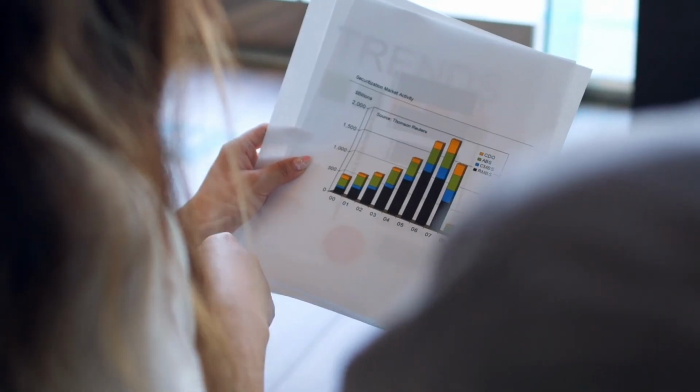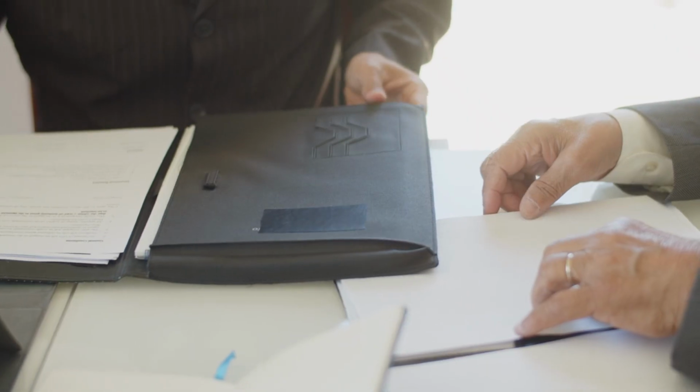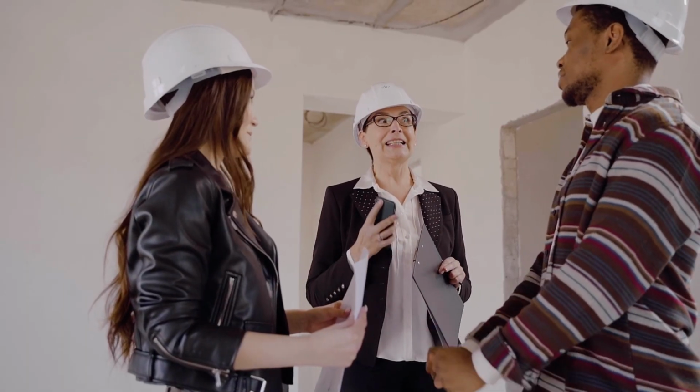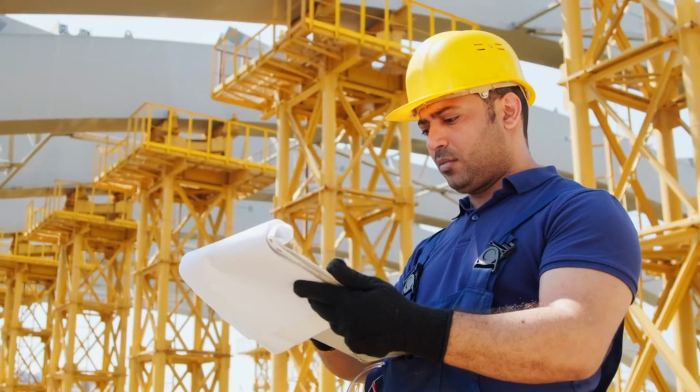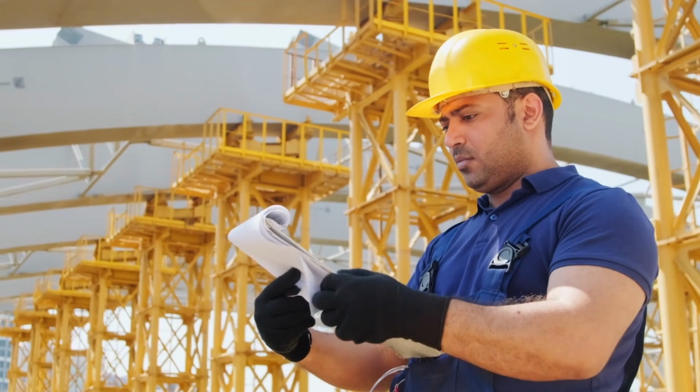In construction, implementation should connect to everyday controls, tender review and approval, procurement and subcontractor engagement timing, site reporting and job costing updates, monthly finance reviews and cash flow checks.